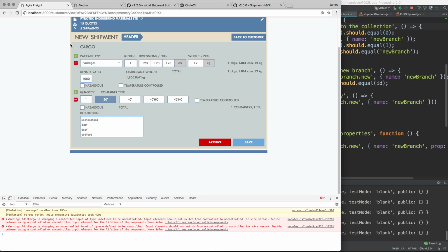The information they don't have is kind of this external stuff that the stakeholders need to bring to the table. That external stuff is not UI expertise. UI expertise comes from the development team. Business processes, business trends, that type of thing is what stakeholders need to provide. They also need to provide budget and timelines and other types of factors that the development team may not be aware of. But there is a clear separation of responsibility. The implementation and decision making is all within the Scrum team, and the link to the rest of the business is provided by the product owner.